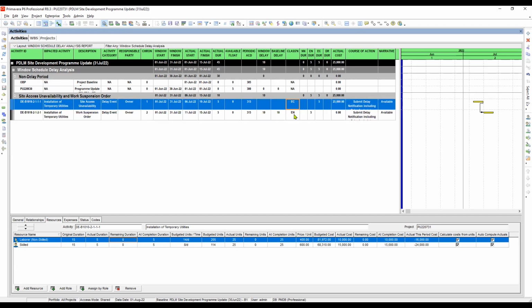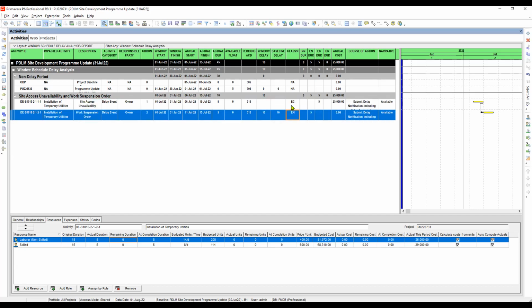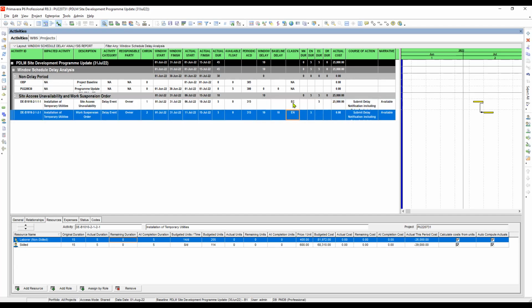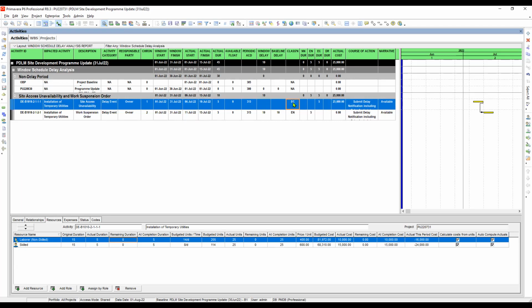The contractor had no definite direction of what to do because there was no instruction or response from the owner. So we can assume that they have to pay for the standby and idle time of the workforce. Since this is excusable and compensable, we look at the excusable and compensable column and put it here as 5 days.